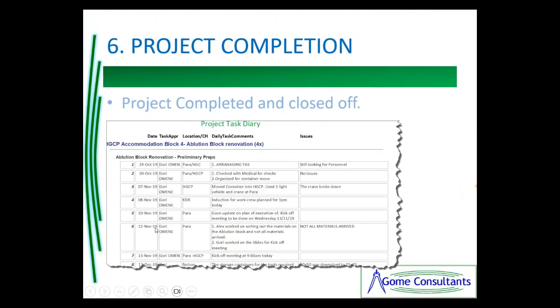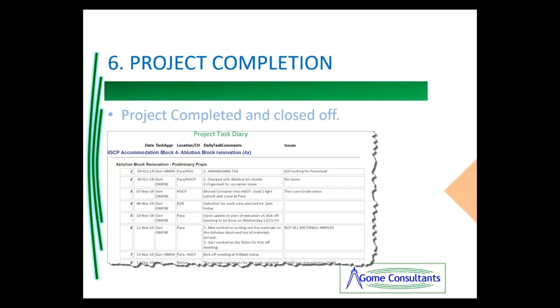When the project is completed successfully to the client's satisfaction, the project is closed out. Normally a certificate of completion is jointly signed. From the project tracking database, daily reports, cost reports, summary of invoice and other reports can be generated. The type of reports can be tailor-made to suit specific needs.